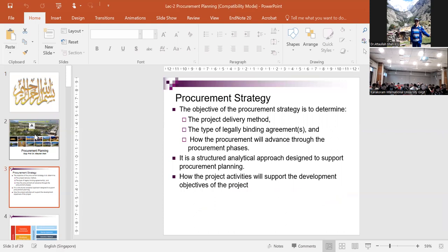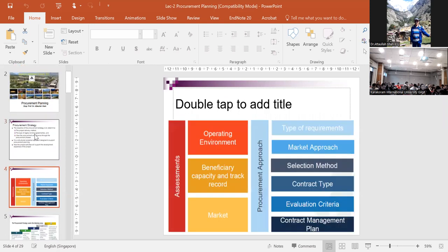The procurement strategy is basically to determine what procurement method we will use, what kind of agreement will be adopted, and what the different phases involved in the procurement will be. It is a structured analytical approach designed to support procurement planning - how the project activities will support the development objectives. The operating environment, beneficiary capacity, track record, and market are very important. These include the type of requirement, market approach, selection method, contract type, evaluation criteria, and contract management plan.